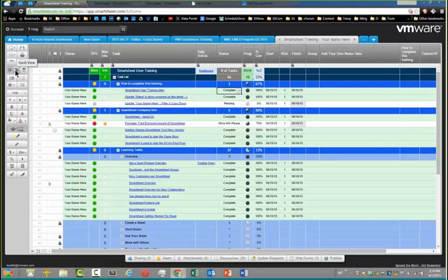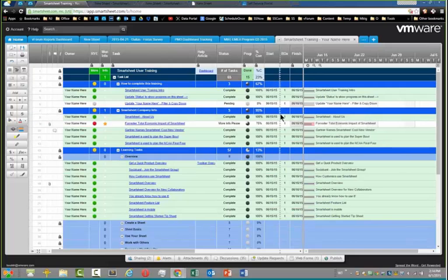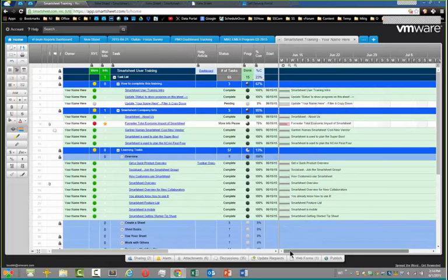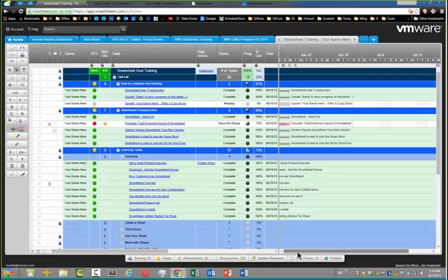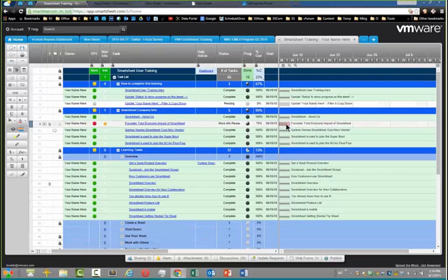Oh, that's the other thing we didn't even talk about yet, calendaring. So you'll notice I have a Gantt calendar over here, and I can zoom in and out on this as much as I want. I think all my dates are the same. That's why it's showing up like this. But you can see here that this is 75% done, so the gray bar on that, as I go back to pending, there's no gray bar within that gray Gantt bar. Once I move into in progress, it's 50%, which gets you to halfway, and 75%, and then ultimately it'll be complete. So the gray bar will go from one end to the other inside. So Gantt and then calendar.